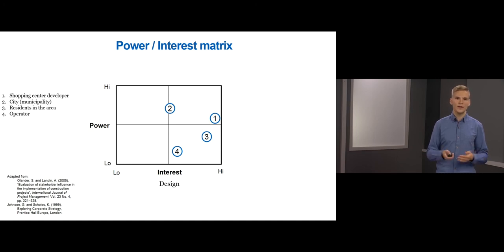In turn, the residents in the area are very interested in it as well, and have some power to influence decisions due to the right of appeal that can influence the plan. Lastly, the operator has quite a bit of interest, but relatively low power to influence the project's decision-making at this stage.